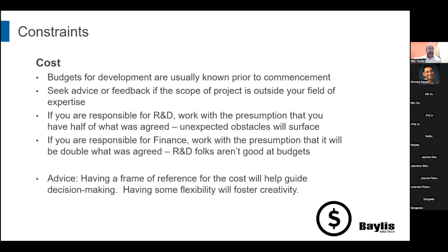Like, what is it going to take? And for sure, with supply chain, you need to be thinking on a couple fronts, which I'll share later on. For new product development, there's the manufacturing process, or the way that something gets made. If you're making something very bespoke, you might be in for a very long lead time for tooling or customized components, or even standardized components nowadays, like you're saying, Sangeeta, with lead times that we're seeing anywhere from 6, 9 to 12 months. So all those things factor back into that other constraint of time.